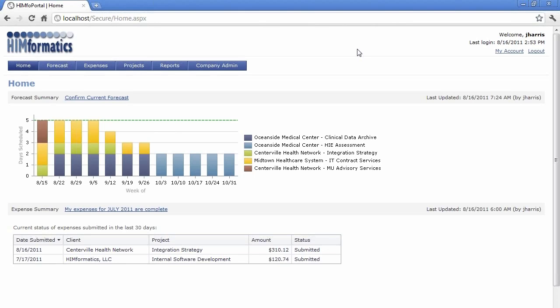This shows the forecast 12 weeks out with each of the projects that they're going to be working on over the next 12 weeks. And also, we forecast based on how many days per week somebody is busy working. So on that bar chart, you can see on the left, the y-axis goes from 0 to 5. And on the x-axis, it's each week. This is actually the DevExpress bar chart in stacked bar mode, so you can see which project they're working on which week, and the proportional bars are stacked based on the number of days they're working on that project for that week.